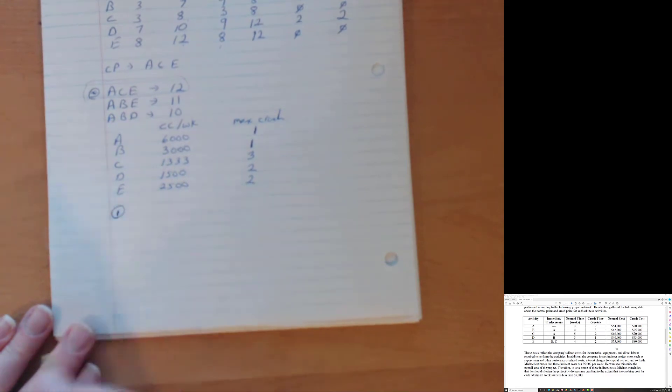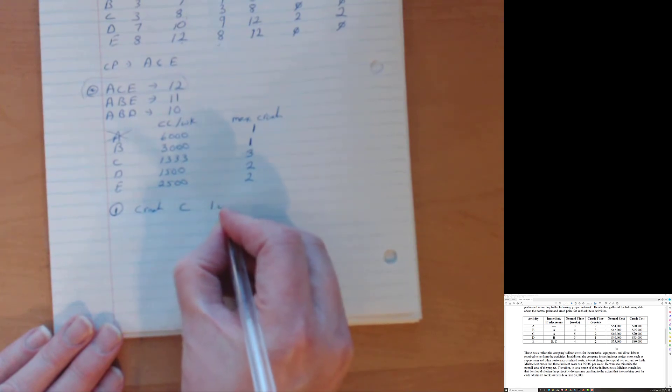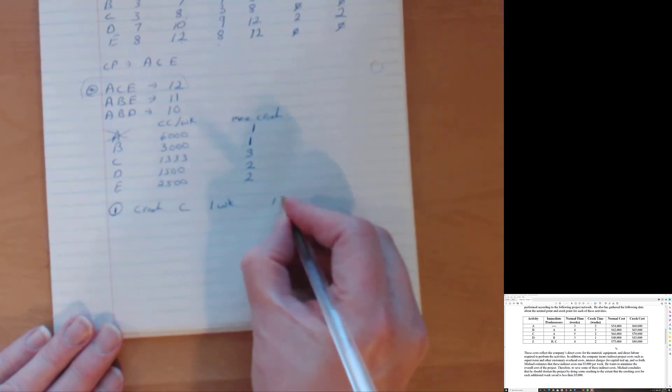So let's see what we can crash. We're going to look at A, C and E, because there are the three activities on the critical path and see which one is the cheapest to crash. And I go, hey, 6,000. That's more than the $5,000 I'm going to save. There's no world where I crash A. A doesn't get crashed. It just, no way. So now we go to the next one. C. 1,333. It's pretty good. E. 2,500. Yeah. Great. But not, not good enough. I should say. So what we're going to do is we're going to crash C one week. Right. And that's going to cost us $1,333.